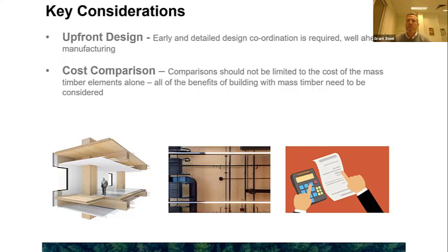The last one is moving on to today's key topic, which is about cost comparisons. So probably start by saying that it's true that timber prices have increased of late, certainly from overseas. What I've been experiencing is that imported material costs have risen by around about 33% over the last 6 to 9 months. However, material costs shouldn't be considered in isolation.